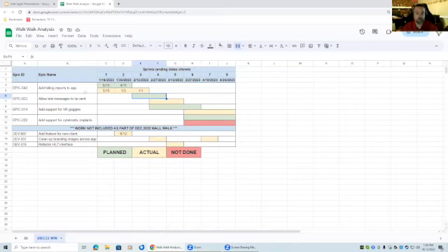Yeah, I'll show you real quick. So where I'm at now, we're modifying this, and this is obviously all dummy data. But one of the challenges where I'm at now is some of the Scrum teams are not protected all that well, which is horrible. So we're actually going to add somewhere on here some kind of indication of here are production bugs that the team got asked to do. It may not qualify as significant enough work to completely derail the plan, but just be aware, a gentle reminder, this team's not protected, and that has the potential to raise the risk of not meeting whatever plan we came up with.